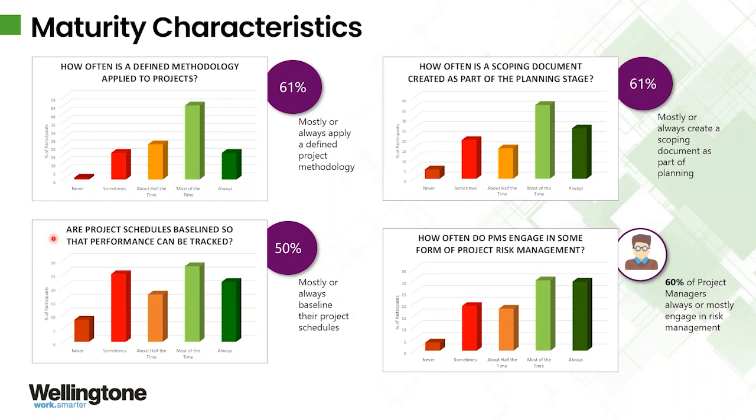And if you ask a project manager, how's the project going? And they say, yeah, it's going pretty well. It's 50% complete. It's 75% complete. It's 22.5% complete. That is a very one-dimensional answer. What's far more informative is if a project manager says, yeah, I'm 50% complete, but by now, checking our original plan, we should be 60%, 50%, 20%, whatever it is. We're comparing against that baseline. So we should be able to compare our schedule against the baseline, our cost against the baseline, our resource profile against the baseline as well.